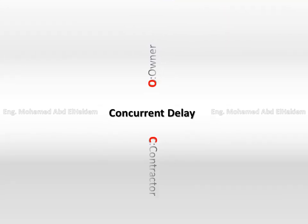Concurrency. Assuming that: 1. The criteria for concurrency have been satisfied. 2. There are the same two causes in each case: 1. Fault of the contractor. 2. The other fault of the employer or the architect.